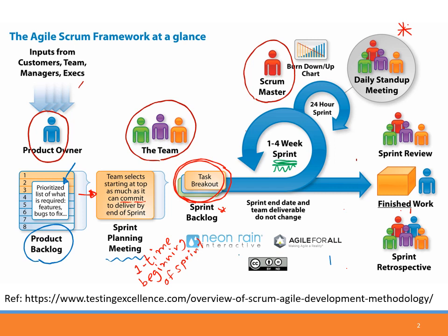Let's say we have one working day of 8 hours. Then you select some tasks, maybe 3 tasks, one of 2 hours, another of 2, and the last one of 4 hours. Then you think you can finish all three within the day, so you select these three, okay? And everyone does the same.